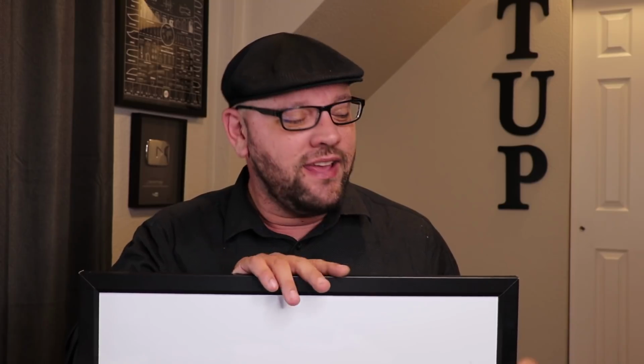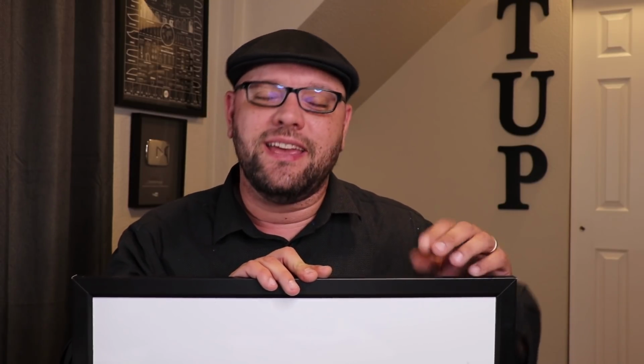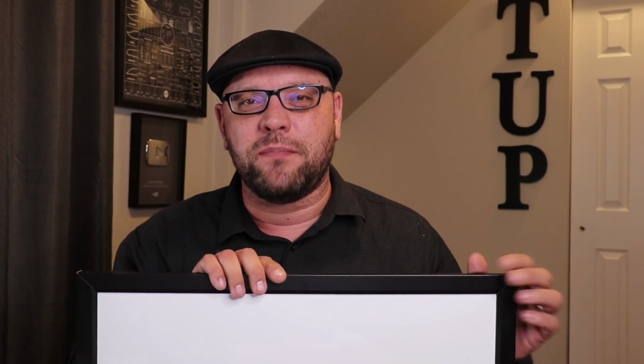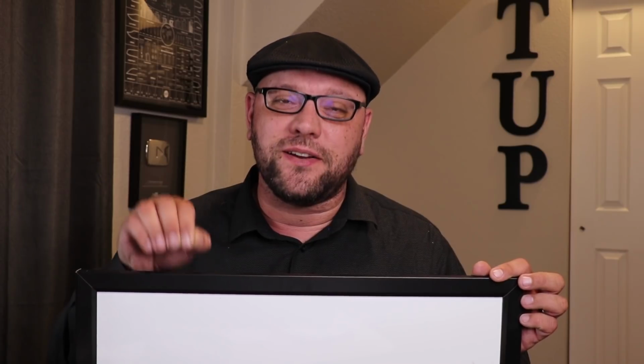For your prepping projects, I recommend having 3 columns. So you're going to have a column for your to-do list, everything that you want to have done in that sprint. You're going to want to have your in progress column, so you're actively working on it, and you want to have your done column, and that's going to be the visual representation that you actually finished a project from start to finish. And again, it's good for morale purposes. So again, we're going to have the to-do list or your backlog,